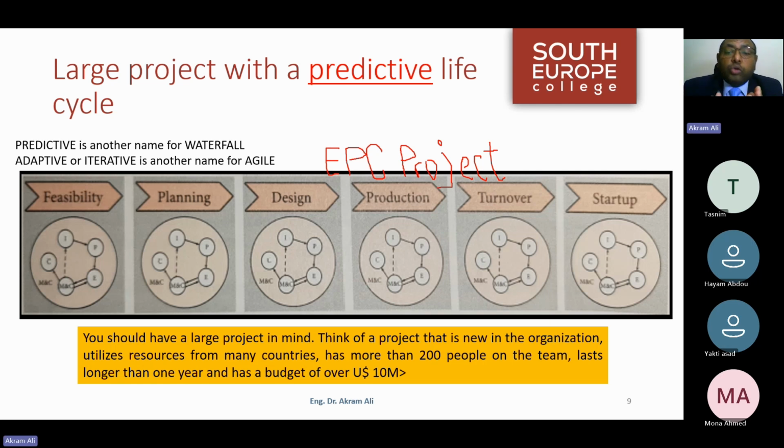So I start to break down the work breakdown structure I already have for the next 6 months into smaller pieces. When I break it down into smaller pieces, I can perform more accurate risk assessment. I can perform more accurate budgeting.